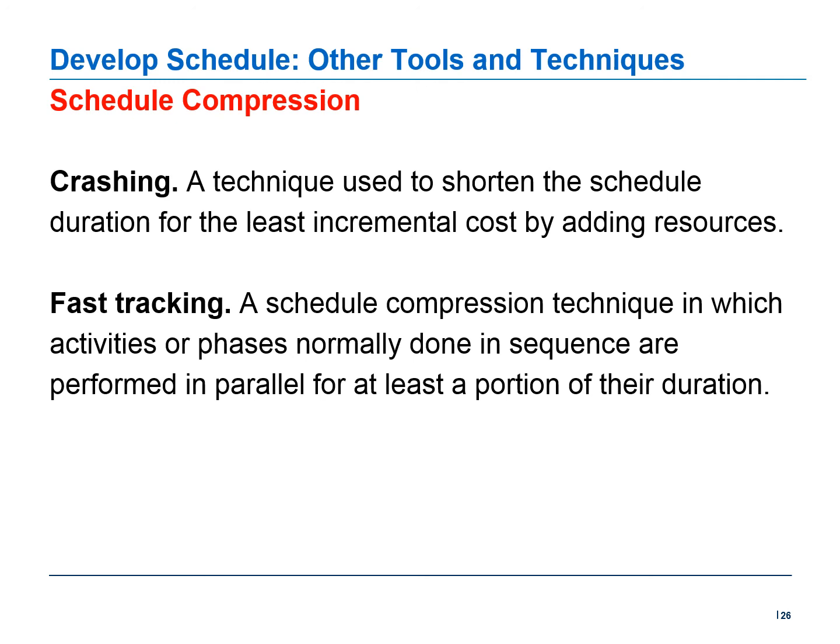Fast tracking only works when activities can be overlapped to shorten the project duration on the critical path. Using leads in case of schedule acceleration usually increases coordination efforts between the activities concerned and increases the quality risk. Fast tracking may also increase project cost.